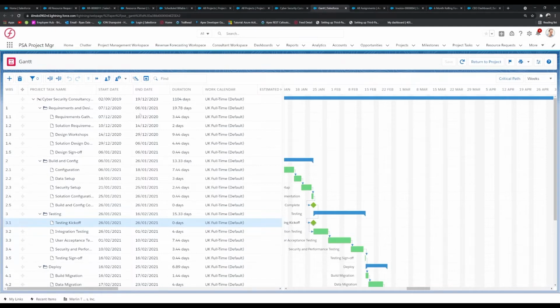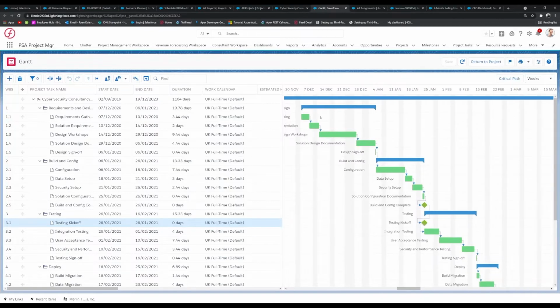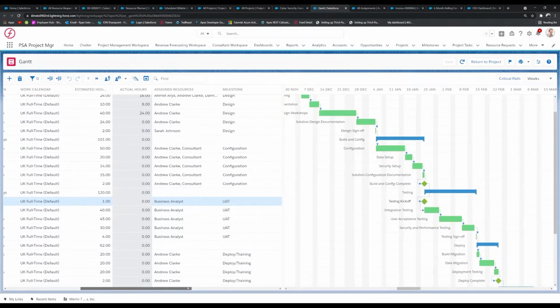This will bring you to a page that looks like this, which is just a general overview of all the assignments, all their details, i.e. the start date and the end date located here, the duration of that task or milestone. And on the right hand side, you get a more visual view of how those tasks relate to each other and the current dependencies. So one task may start here and it may not be able to continue on to the next task until it is finished.